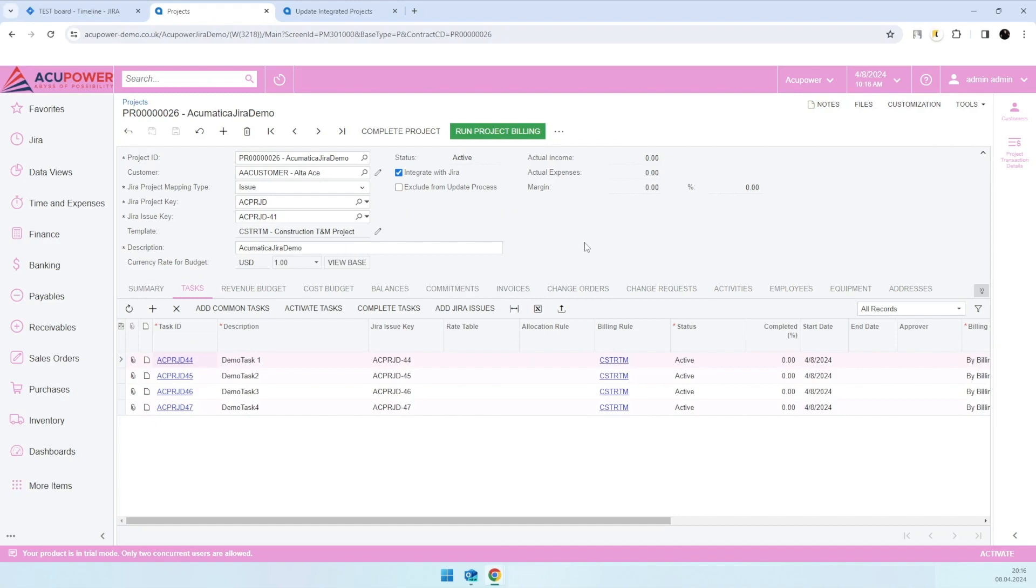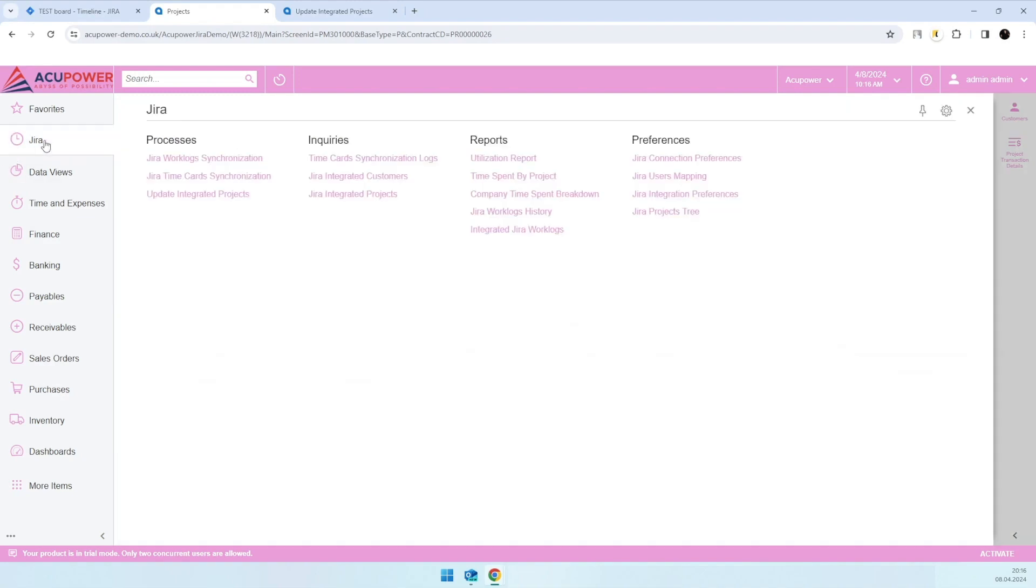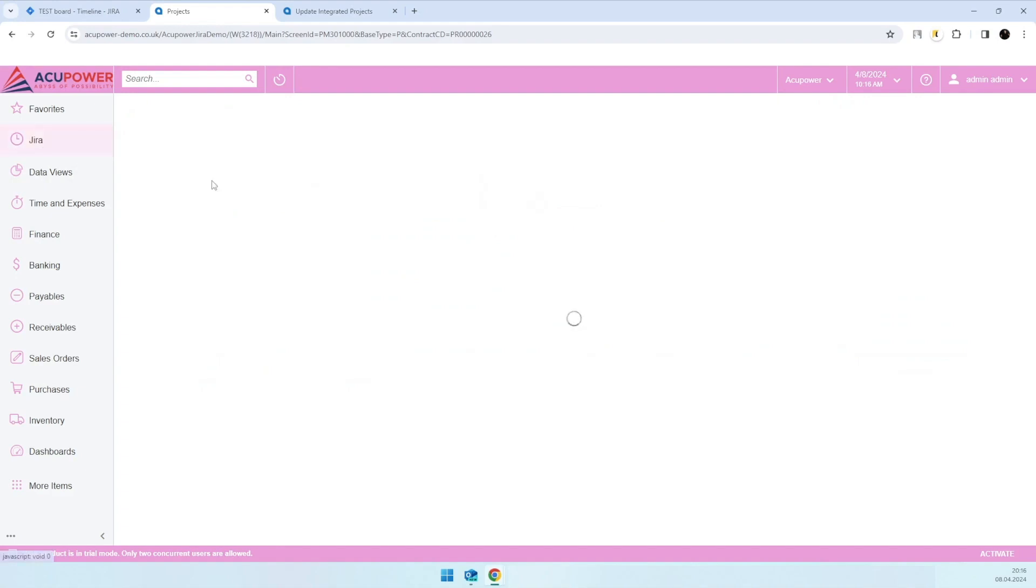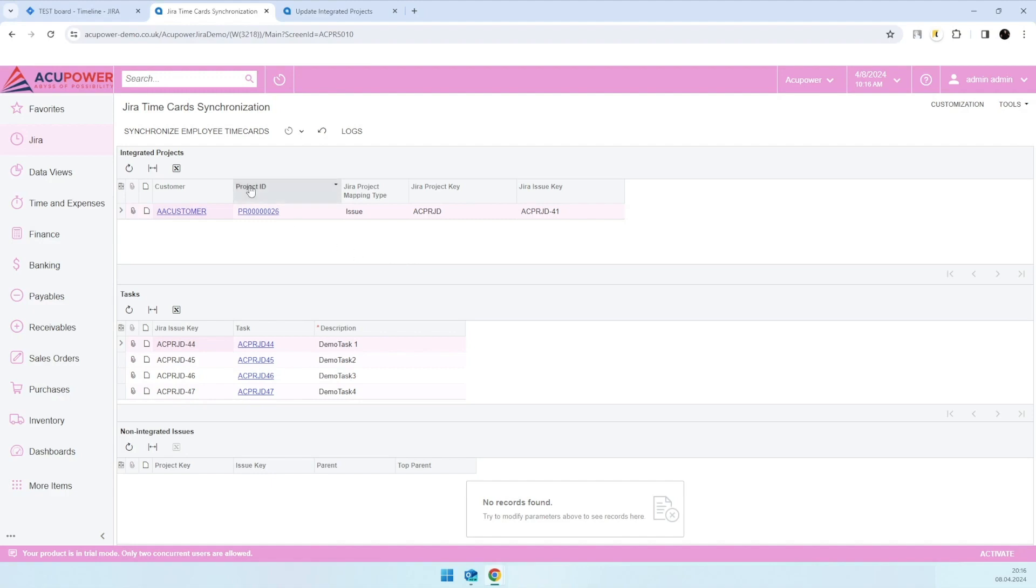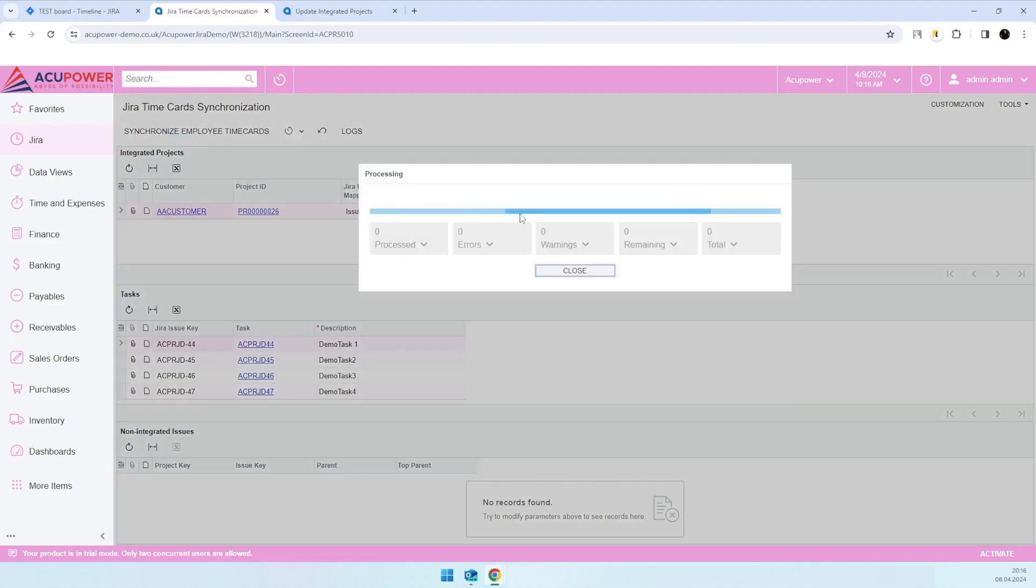The next step would be time card synchronization. The purpose of the screen is to synchronize logs that we populated from Jira into employee time cards in Acumatica for further usage in all usual Acumatica processes. I'll just run this process. It will take a few seconds.